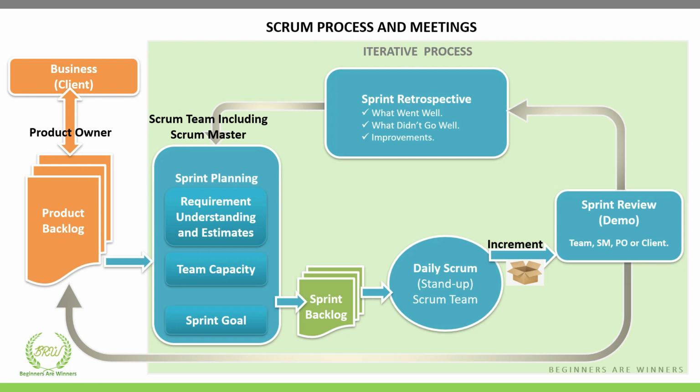For example, a small t-shirt size would mean that a user story or this particular task can be completed in just a day or two. Medium size would mean this user story might take 2 to 5 days to complete. Large may mean that it might take more than 5 days of effort, for example 6 to 10 days, or maybe 6 to 12 days.